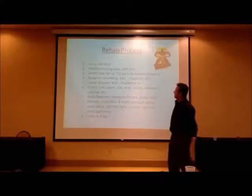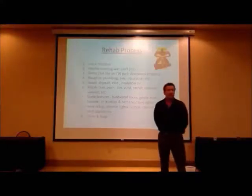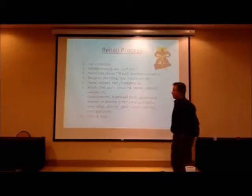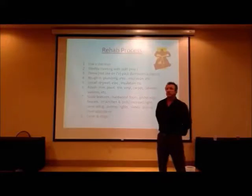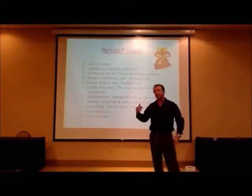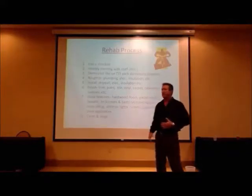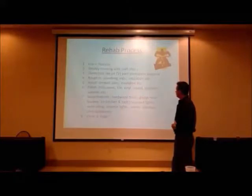The rehab process. Use a checklist. Everybody likes checklists, right? They work, that's why. Have a weekly meeting with your staff, even if it's just your wife. Go over that property and the steps that are involved and what's coming up next, and you've got to order this and order that. Make sure you have that meeting.